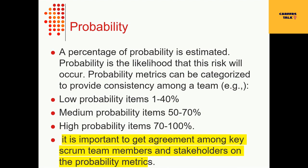What is probability? A percentage of probability is estimated — it is the likelihood that the risk will occur. Probability metrics can be categorized to provide consistency among a team. For example: low probability items can be categorized as 1–40%, medium probability as 50–70%, and high probability as 70–100%. It is important to get agreement among key Scrum team members and stakeholders on the probability matrices.